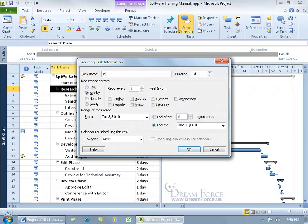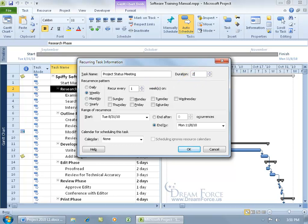Let's go ahead and type in the task name, project status meeting, and then the duration for the meetings. Let's go ahead and do hours, type in 2H for two hours.